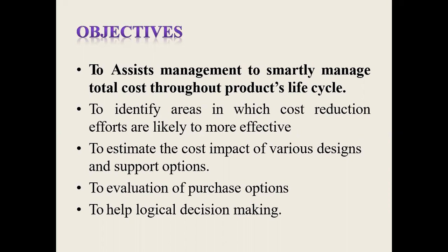So if you take the example of building A, then labor may be more, sand may be used, or some sand may be thrown away after the project, or certain problems may arise. So when you start a new project, a second project, at that time you take into consideration that yes, at this point I require this particular labor, or this many laborers are required, this much sand I require, and whatever cost reduction is possible, it can be effectively carried out.